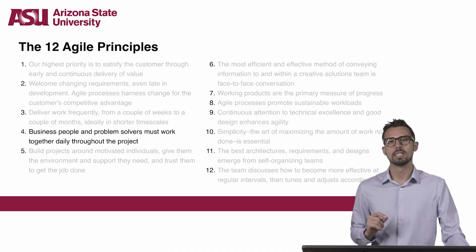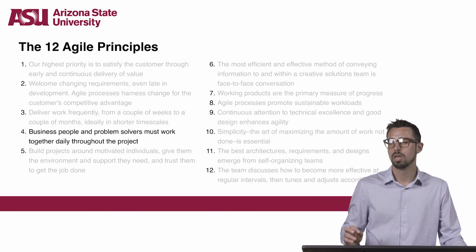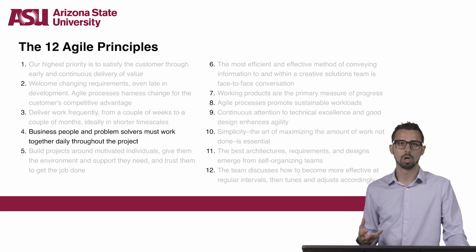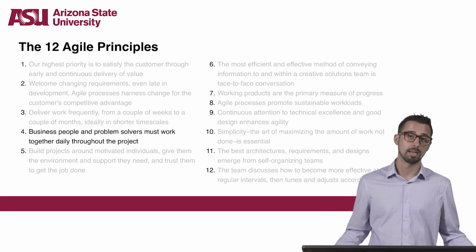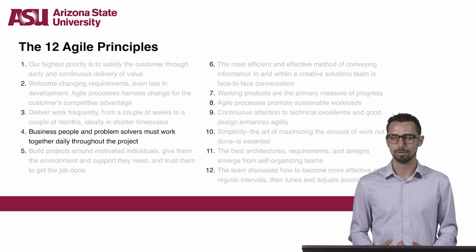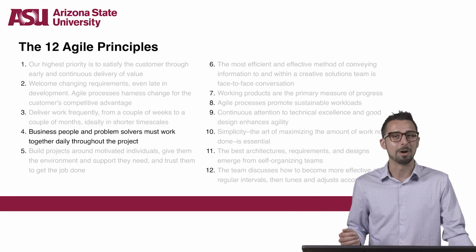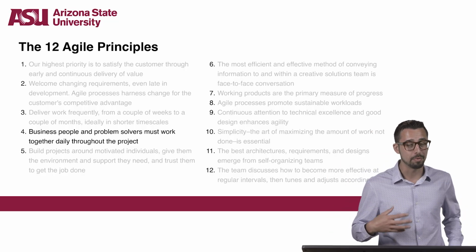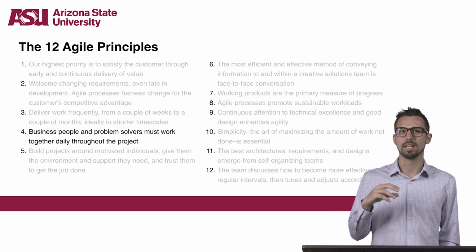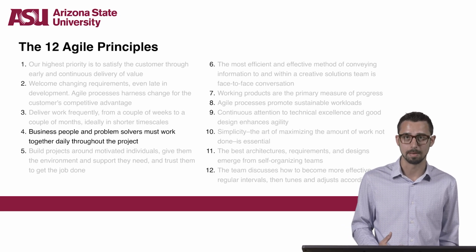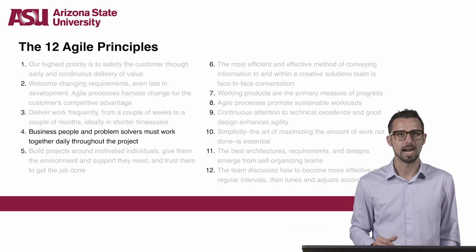This Agile principle states that regular communication with all stakeholders is critical to the project's success. Commonly, this involves a short daily meeting with both the project team and any other key stakeholders. Oftentimes we call those meetings stand-ups, and I have a little bit of a saying here: when you're in a stand-up meeting, you should stand up if you are able to do so. The important reason is that if you are standing, you are more likely to go quickly. Your stand-ups should be short. They're not meant to be problem-solving meetings. It is just a status update. That's it. Where are you at? Where are you going? How can I help you clear any blockers? Those are sort of the good questions to ask in a status meeting.